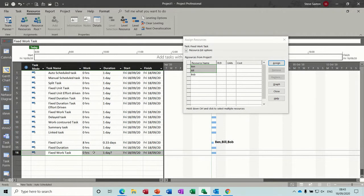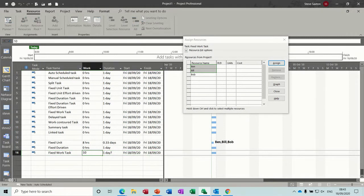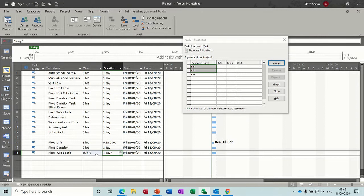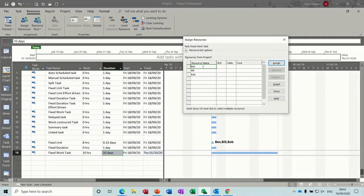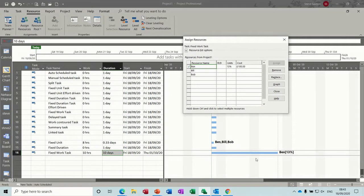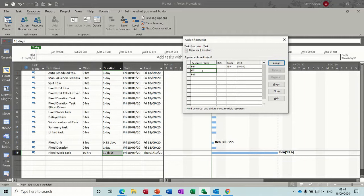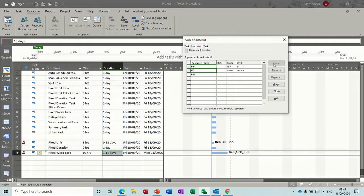So let's say we want to pay for ten hours work, so that's the fixed element, over a ten day period. That's how that works. And let's say you get one person doing it. So that's just 13% of Ben's time over that time period. Because the tick is on, if you then decided to add another person, it is going to drive the duration down, as you can see there.